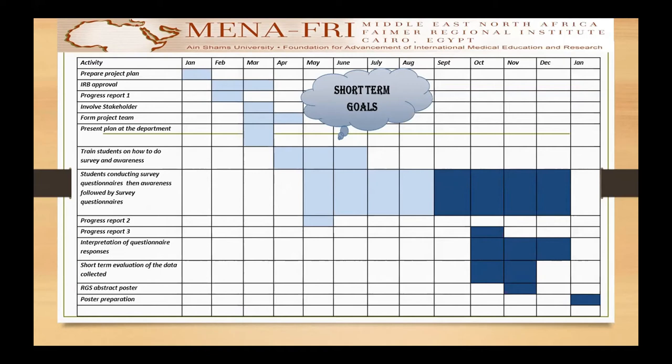I'm starting now to do the awareness process, but I had to slow down because the students have their exams, so the process has slowed recently. I think I achieved my short-term goals, which were mainly to raise awareness among students, train them on the problem and the survey, and estimate the awareness of community members toward the problem. I'm now going to start the awareness process through the students to the community members, then I will do the post-awareness survey.